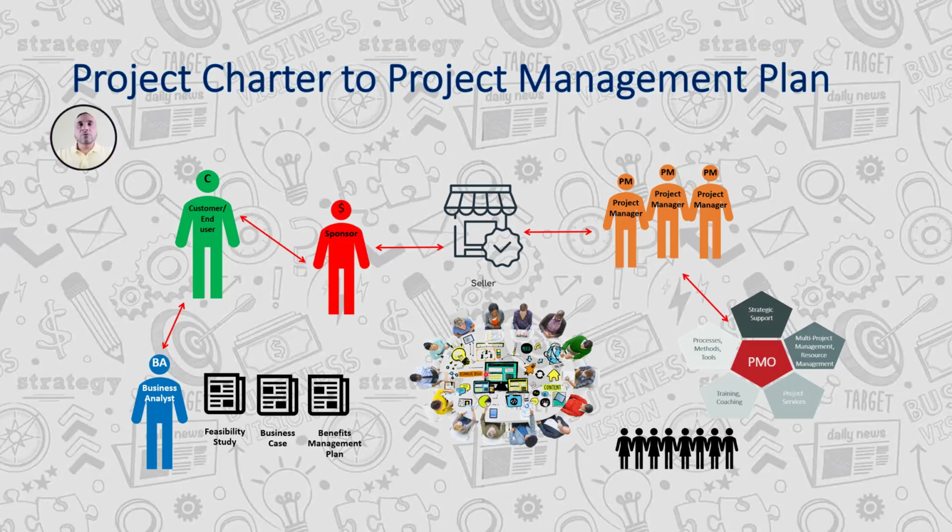We do the change control system to avoid gold plating or scope creep. Gold plating is something provided by the seller, while scope creep is something asked for by the stakeholders, not written in the project management plan, and we deliver it. In gold plating, the project budget doesn't change, but in scope creep, the project budget changes and the sponsor becomes angry. So the purpose of integrated change control is to document all the changes so they can be backtracked and validated.